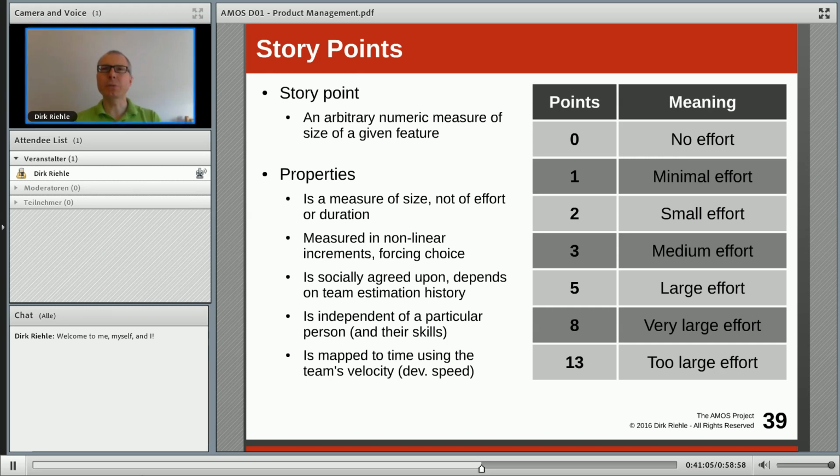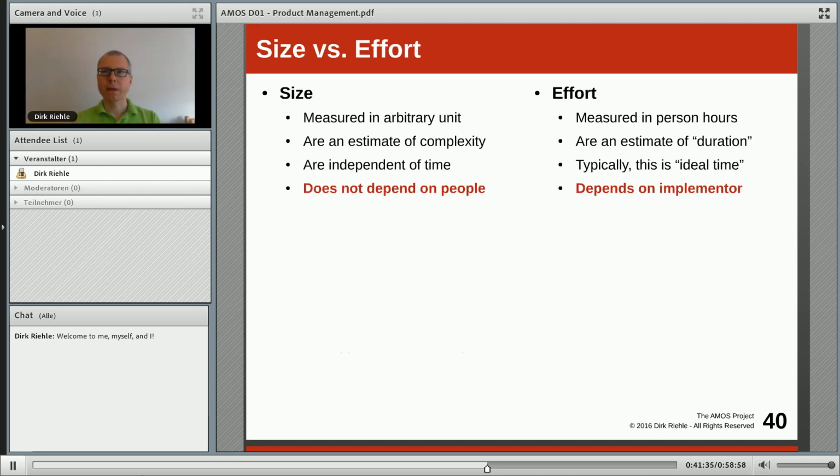So this needs to be experienced as part of planning poker, and after a couple of sessions, the team will be able to agree on some feature as a medium or large or small effort and reliably, repeatedly do that over time. Two different medium efforts will always be medium efforts after an effective planning poker session to determine what the size is.